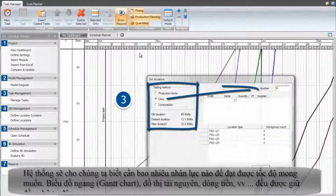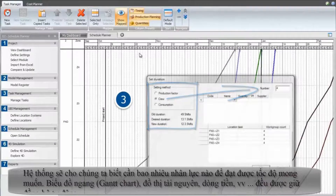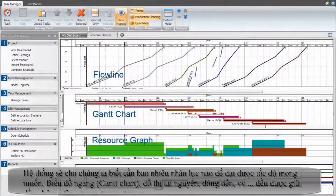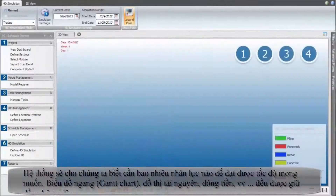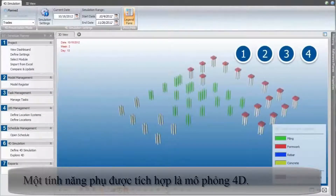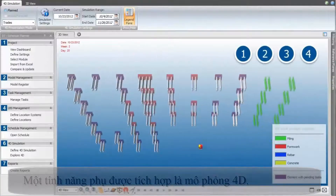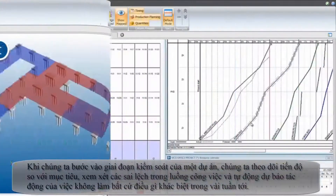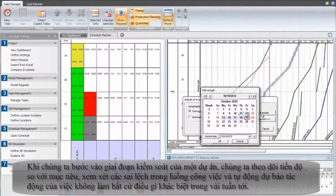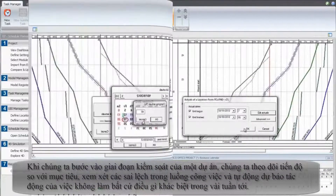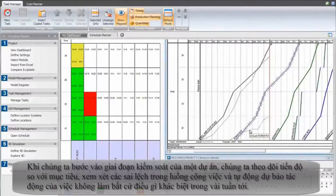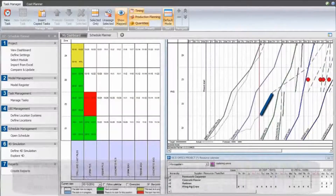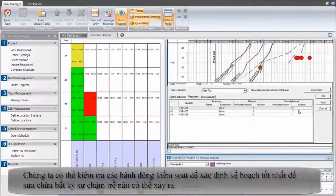The system will tell us what manpower is required in order to meet the desired pace. The Gantt chart, resource graphs, cash flow, etc. are all kept in sync automatically. The byproduct from the integration is a 4D simulation. As we move into the controlling phase of a project, we monitor progress against the target, review deviations in the flowline view, and automatically forecast the effect of not doing anything differently over the next few weeks. We can test control actions to define the best plan to correct any potential delays.